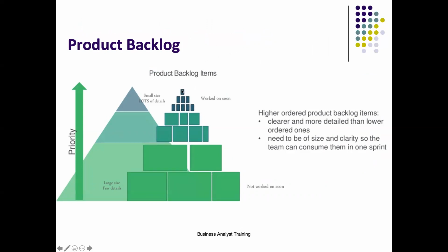As things come to the top of the priority, the product owner and business analyst start elaborating or analyzing them, and that is how the product backlog will look, or how it will actually exist, right? Things on top priority will be clearer, and the things at the bottom of the list will be more vague, at a very high level from a scope perspective. Okay.